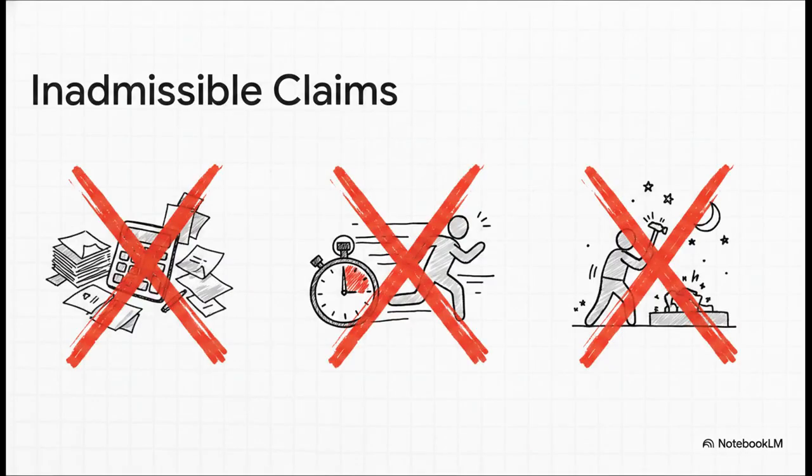But hold on, don't get carried away, because not all claims are admissible. What about the cost of preparing the claim itself? Yeah, generally, that is not a recoverable expense. The contractor is simply providing information to help the administrator figure out the cost. And what about unapproved acceleration of the works, or unapproved overtime? Also inadmissible. You can't just decide on your own to speed up the work, spend an absolute fortune on weekend overtime without prior agreement, and then casually send the client the bill.